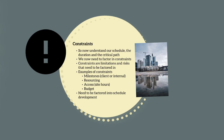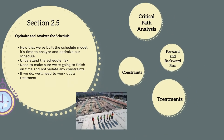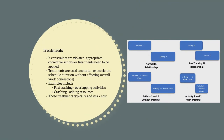These constraints need to be identified and assessed. On a major project, identifying every constraint and resourcing issue can be complicated and challenging, and beyond the scope of this course. But understanding the types of constraints and how to identify them is still an important step. When a constraint is violated — for example, the project duration is anticipated to take longer than what is contractually required — we need to put in place a treatment for that constraint. Treatments are scheduling techniques used to shorten or accelerate the entire project duration without affecting the overall work done, i.e. the scope. These techniques will change the delivery methodology and the delivery solution.